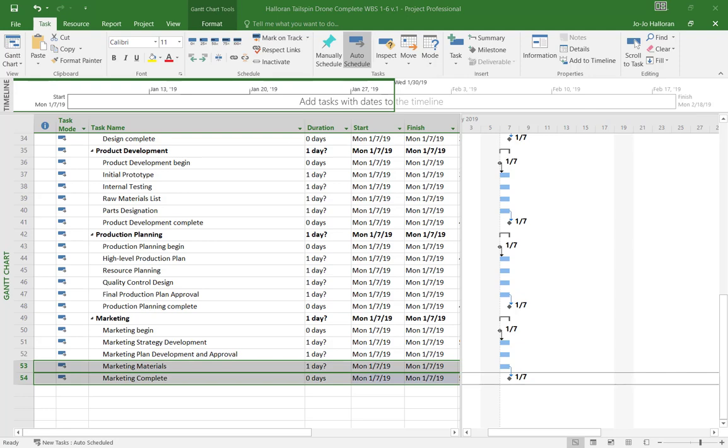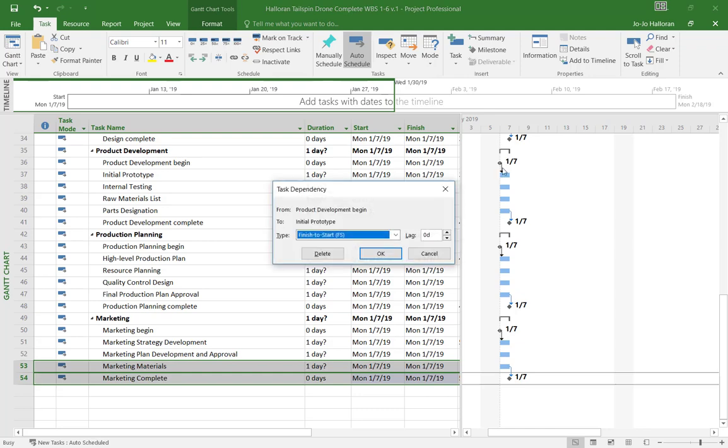Okay, now that we have the milestones linked with the first subtask, you can see over here in your Gantt chart view the little arrow. And you see the diamond milestones are identified by the little black diamond. And then here's our link, because if we rest our mouse pointer on that line, or you can even double click there, you can see your task dependency.